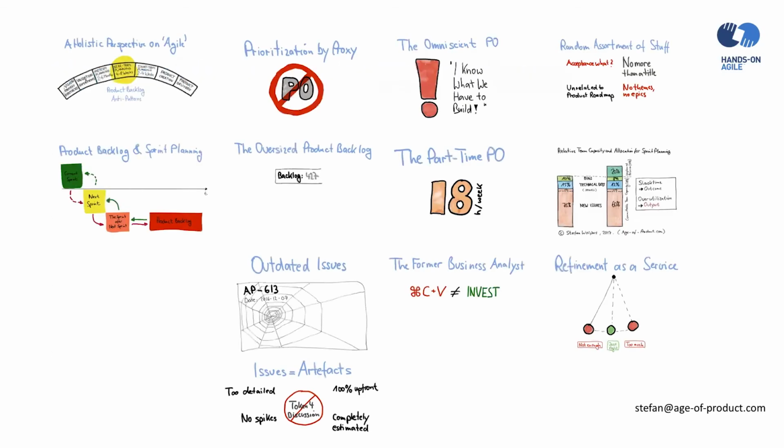Okay, let's summarize. I believe you need to defend your product backlog at all costs. It's the make or break whether your team becomes a real team or will stay the internal agency, and whether you will become the feature factory churning out stuff that probably no one is interested in. The product backlog is, for another reason, very crucial, because if you do the product backlog refinement in the right way, it's also a very nice way of doing a preliminary sprint planning. So my team spent seriously no more than 15 or 20 minutes on sprint planning 1, because we actually talked about this regularly in the days before.